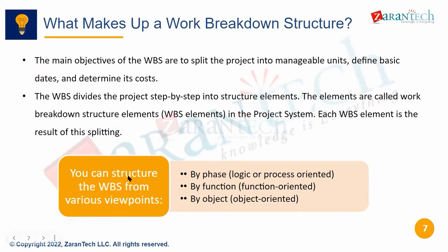Now we saw that we can have a WBS created from various viewpoints: by phase, logic or process oriented, by function oriented, or by object. Now object here is deliverable. What are the deliverables in that project? We saw that example, that rotor, that is actually the deliverable or object. Phase, I give you an example. Procurement can be one phase, execution is one phase, project planning is one phase, closing is one phase, and so on.